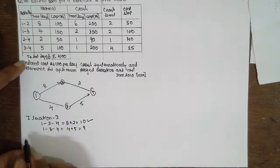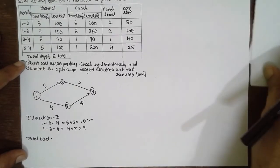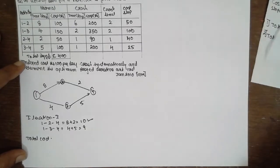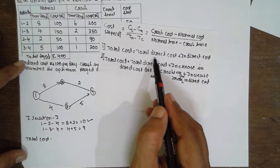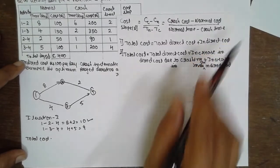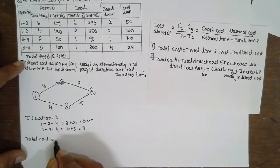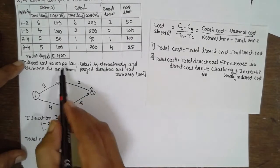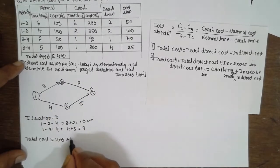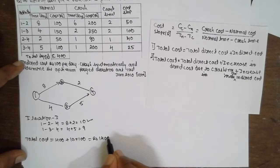Now we are going to find out the total cost. The formula for total cost is: total direct cost plus indirect cost. Total direct cost is 400, plus indirect cost: 10 into 100. The answer is rupees 1400.